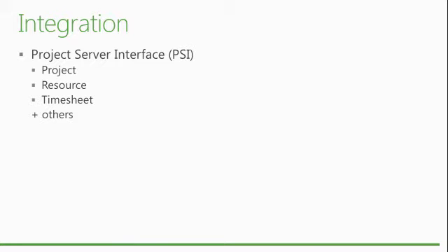And some of the customizations that we do for clients is maybe that they have a timesheet system that's already in place in Oracle, Oracle Financials or something like that. But they still want the data in Project Server because that's how they handle their costs and their actuals. Maybe they're in single entry mode or something like that. So you can code an interface between the two. There are some partners that help you to do that, or we can custom code it. So it's not out of the box.